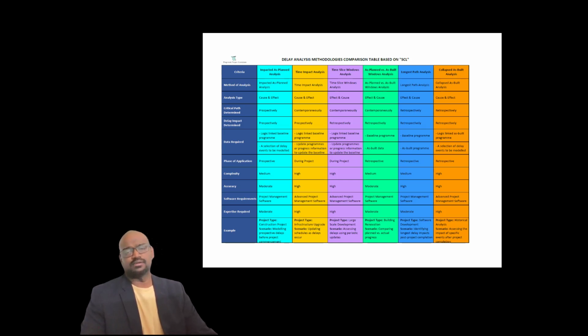For example, if you are renovating a building, the building is being completed and you want to compare the delay only in the renovation part, in comparison with the original plan, what the original available building was, what the delays that have occurred are, and who is responsible for the delays. So the main aim of the retrospective delay analysis is to fix the attributability. Attributability is nothing but the responsibility for the delay, so that that party is responsible for the time and the cost compensations.